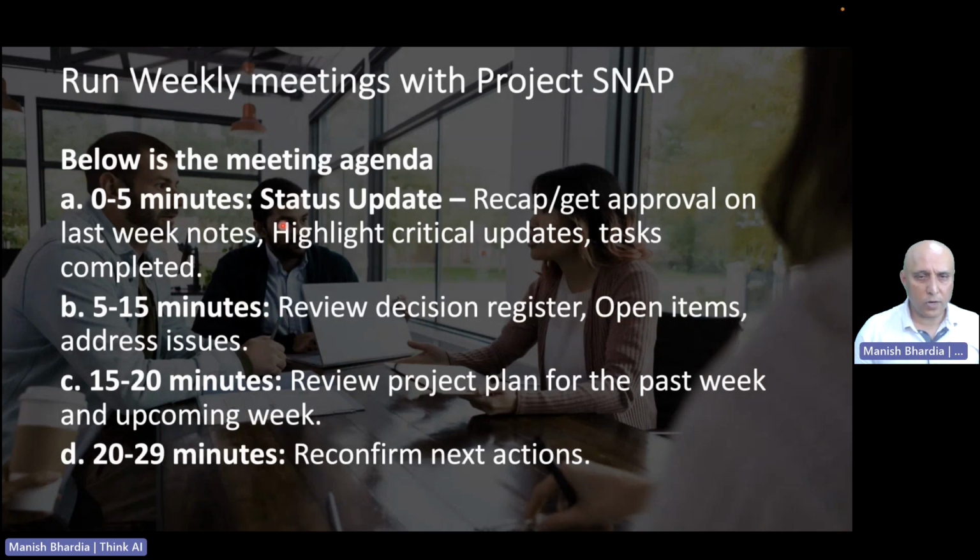One of the most important things in the weekly meeting: you provide a status update, but then do a recap of last week and get approval on your last week's meeting notes. Approval on last week's meeting notes is very critical because I want to make a joint partnership with the client. We are busy, they are busy.